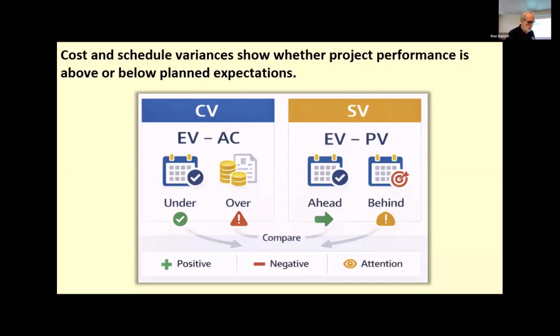A lot of times, places I've been will have what they call an overhead combined number, which takes into account not only salaries but also overhead, and so we call it a loaded number. They'll say, okay, every hour is $200 loaded time, and so we'll take that $175,000 divided by 200, and that tells us how many hours of work we're behind schedule. That's how we convert all of that into dollars. And so earned value is combining everything into dollars.